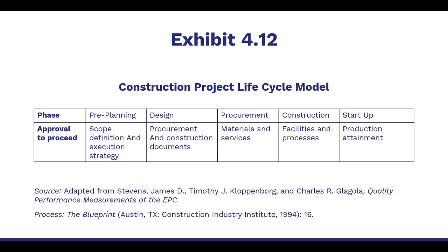Then we have what's called the construction project lifecycle model, where we're dealing with pre-planning, design, procurement, construction, and startup. This is just as in other project applications, since construction projects differ greatly in size and complexity, a variety of project lifecycle models are in use. A generic construction project lifecycle model is used for design build projects.